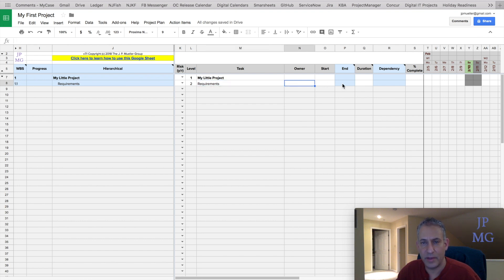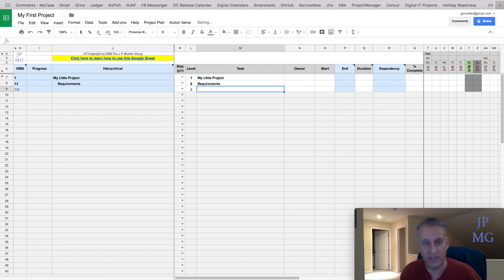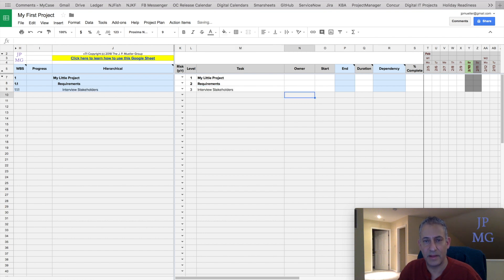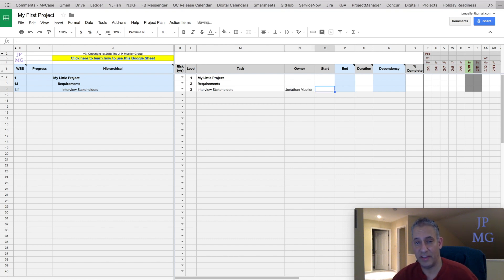I'm also going to make this a parent task. A parent task is one that has a child — one that's going to be indented, or in other words, will have a level that's higher than itself. So for example, I'm going to make this level three and we'll call this "interview stakeholders." Now I'm going to start giving myself ownership and fill in some information about dates and durations.